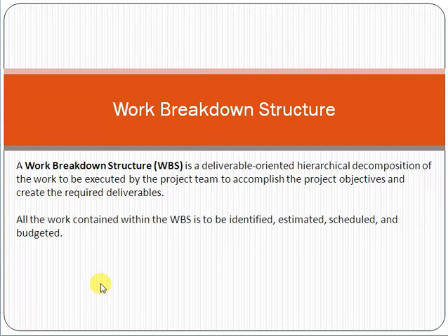Let's take an example here. As a project manager, you have to work on an e-commerce solution project. If someone says you have to work on an e-commerce solution, friends, it's a very broad term. We must understand that first of all we have to decompose the work. Decompose means divide and rule. We have to divide the work, and we must reach a level through which we can understand the project. So work breakdown structure is a deliverable-oriented hierarchical decomposition of the work to be executed by the project team to accomplish the project objectives and create the required deliverables.